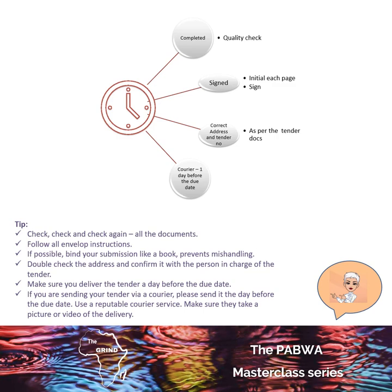Most cases you do an original, a copy, and an electronic copy on a USB. Sometimes you are requested to print nine or five copies. Look at the tender documentation and understand the cost implications to your business. If you are not in Cape Town and you're submitting a tender in Cape Town, you need to use a courier service — make sure your timelines have been factored in. A couple of tips: check, check, and check again on documents. Sometimes I go through three or four people before we actually submit a document. Follow the envelope instructions — those are critical.